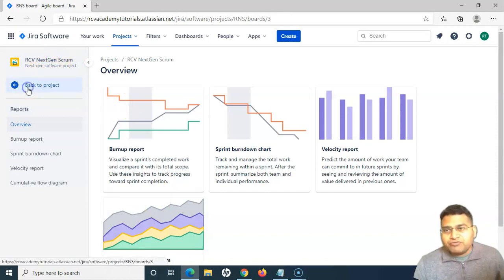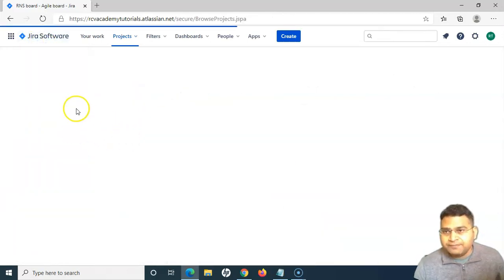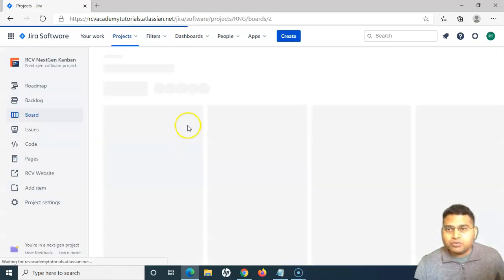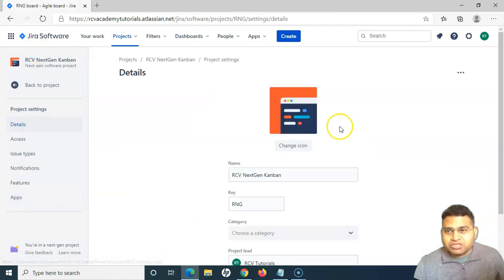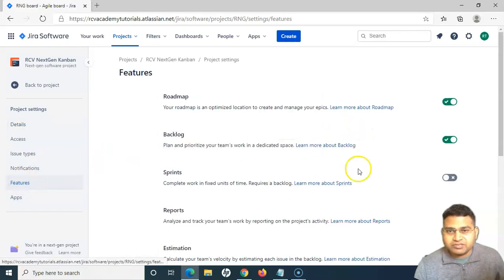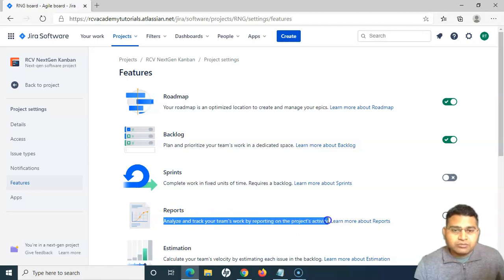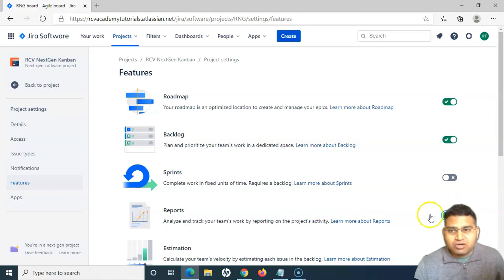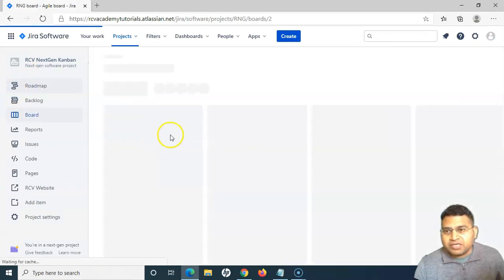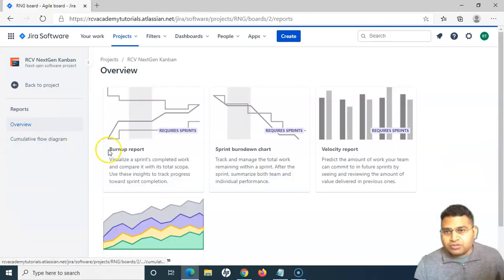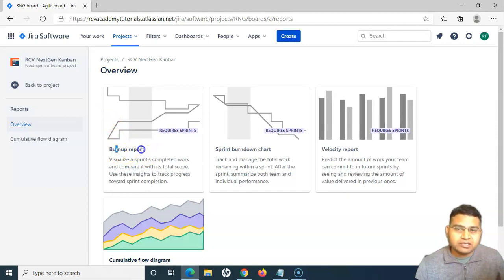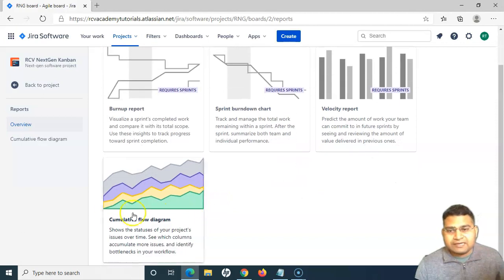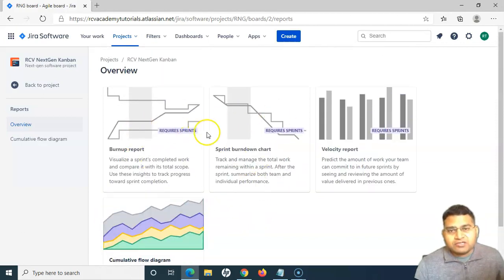That's about next-gen Scrum. If we go back to next-gen Kanban — in the next-gen Kanban, the reports feature may not be enabled. To enable reports, go to project settings and then features. Here the reports toggle is turned off, so we need to turn it on. Once you turn it on and go back to the next-gen Kanban project, the report option will be available. The reports available for next-gen Kanban are: burn up report, sprint burn down chart, velocity report, and cumulative flow diagram — the last being most relevant to Kanban.